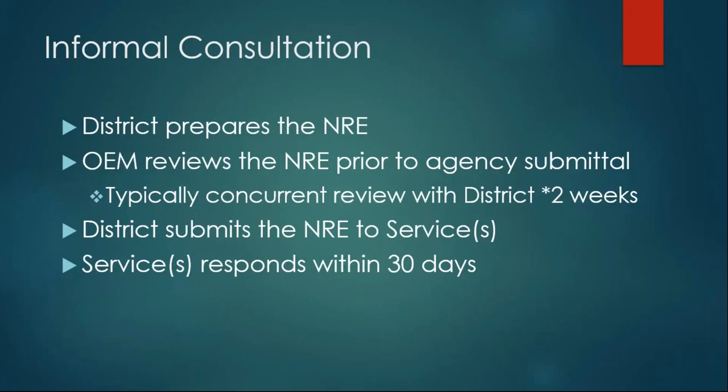And then the district submits the OEM-reviewed NRE to the services. The service typically responds within 30 days. For Turnpike projects, if the project requires an FHWA decision, therefore resulting in a NEPA document, OEM would also review the NRE prior to agency submittal. But for those state-funded projects, we would not review the natural resources evaluation.